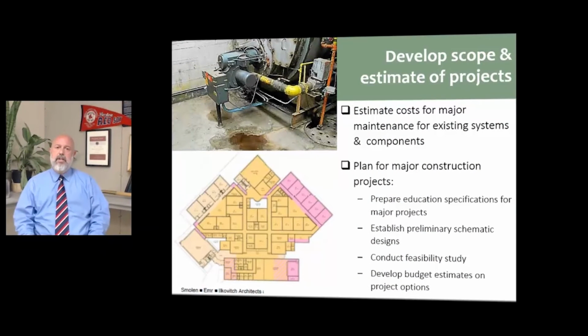Project cost estimates with a sufficient level of detail and accuracy need to be developed in advance of preparing the CIP. Appropriate due diligence and preliminary project planning, such as physical plant analysis, educational programming, demographic analysis, independent estimating, with the appropriate level of educational specifications, design, and feasibility studies, will ensure realistic budgets, which help the district resist political pressures to promise more projects than it actually can deliver.